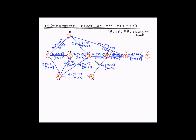In those calculations we were not looking at the preceding activity for activity F, and we were assuming that all other activities are happening at the earliest start and finish times. Now, C is the preceding activity for activity F and K is the following activity. So if we have to find out the delay possible in activity F without affecting either the preceding or the following activity, that delay is known as the independent float, or IDF.